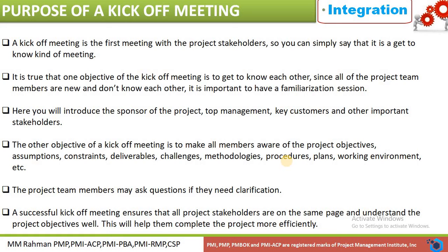Since all of the project team members are new and they don't know each other, it is important to have a formalization session, where the team members of the project get to know each other. We will introduce the sponsor of the project, top management, the key customer, and the other important stakeholders. The objectives of the kickoff meeting are to make all members aware of the project objectives, assumptions, constraints, deliverables, challenges, methodology, procedures, plan, and working environment.